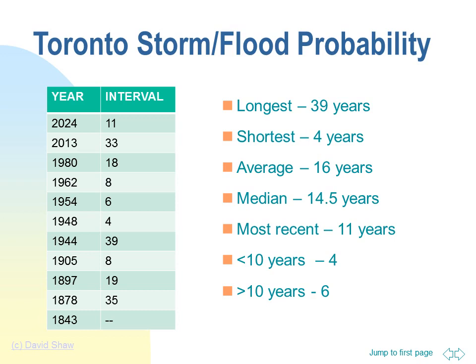If we look for more information, according to the Insurance Bureau of Canada, the Greater Toronto Area has had 6 100-year storms since 2005. This is an average interval of 3 years. However, the downfall was not as widespread as in the severe storms. The shorter the interval, the more imperative it is to avoid the cost of the damage and to mitigate the risk by investing in infrastructure to prevent the loss.